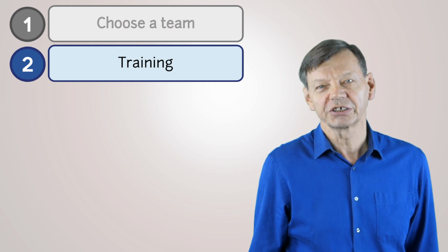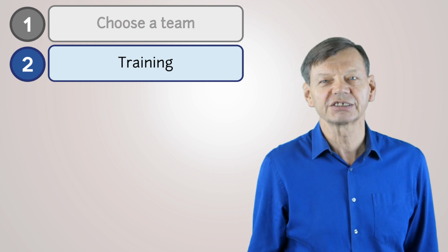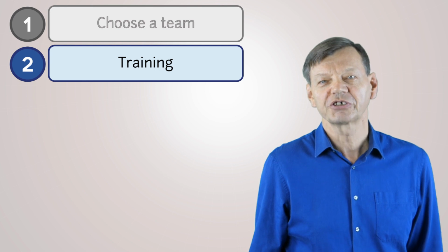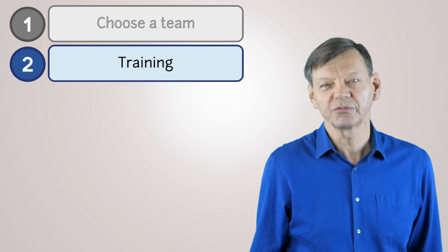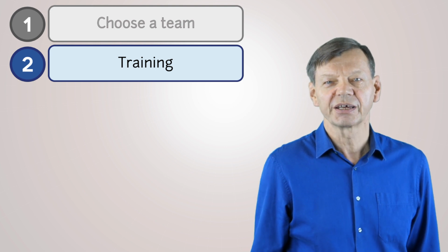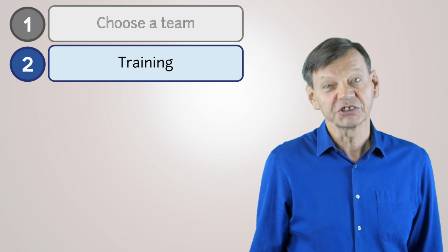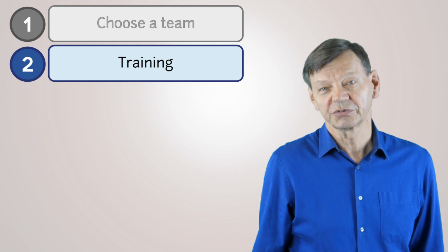Training all stakeholders in Critical Chain ensures that everyone understands the method before using it. This training guarantees that everyone uses the same vocabulary, can grasp the key concepts and imagine how they can apply them to their working environment afterwards. This does not take long. A one-day course is sufficient.